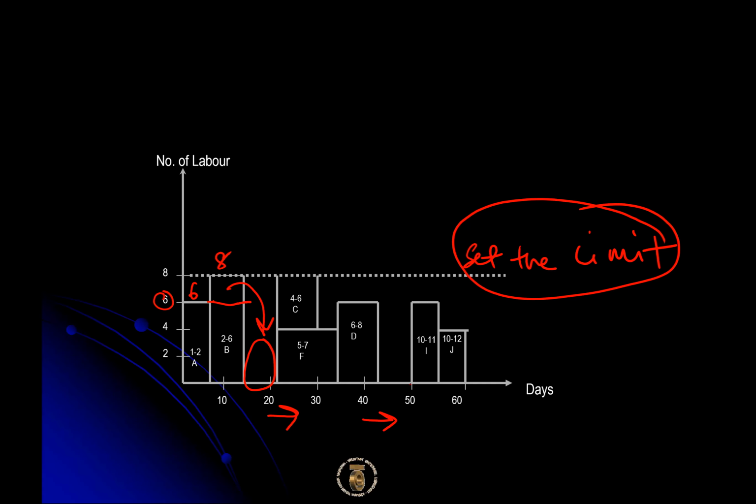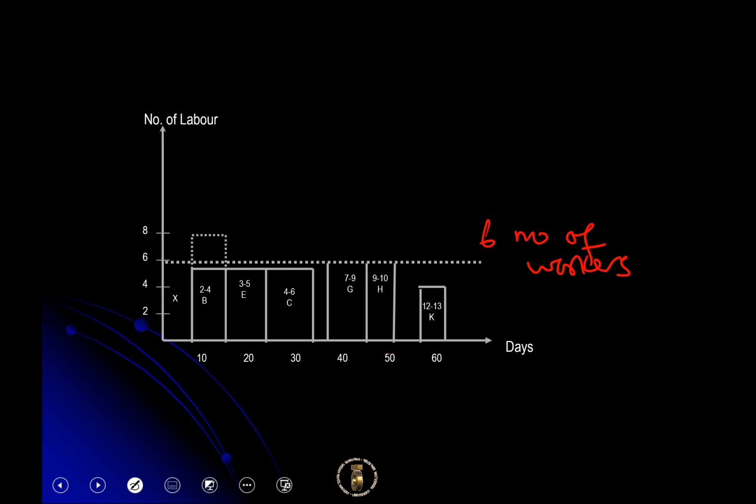It will be pushed forward until perhaps even encroaching into the finish timing of the group of these activities. But fortunately, maybe in this situation it is still okay because we do have some empty spot here where the workers can work on the day where there is no activity overlapping. But there is another situation which we will see in our next example. We are going to encroach into a different project activity. Okay, so we stop.